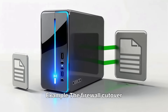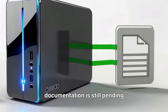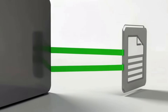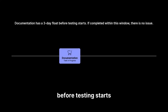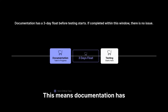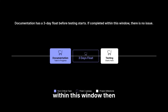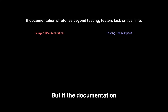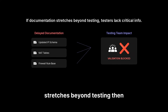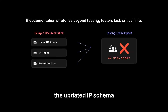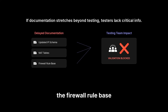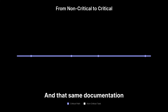For example, the firewall cutover is done, but the documentation is still pending and there are 3 days before testing starts. This means documentation has a float of 3 days — if it gets completed within this window, no issue. But if the documentation stretches beyond testing, then the testers won't have the updated IP schema, NAT tables, or even the firewall rule base. And that same documentation suddenly comes onto the critical path.